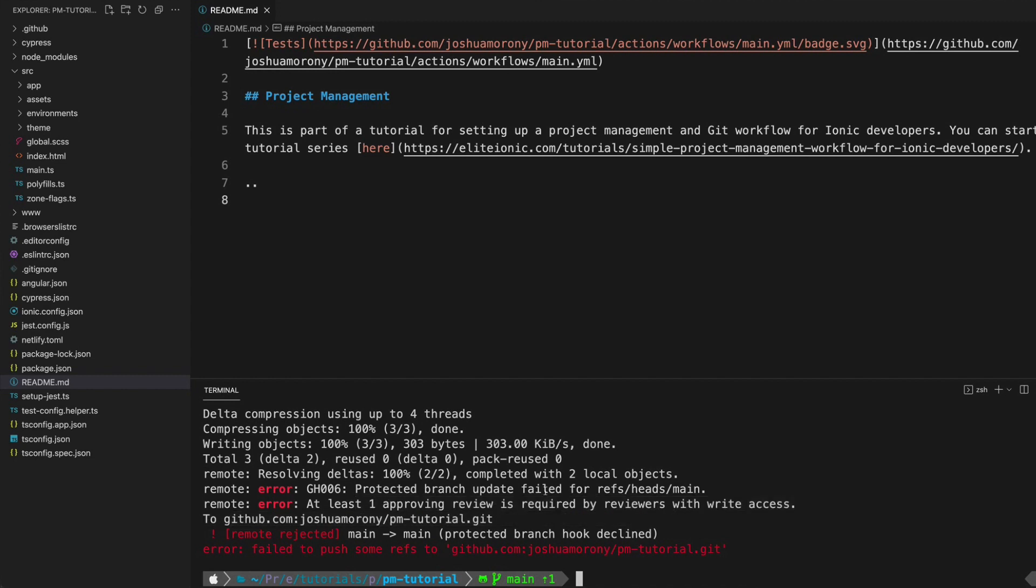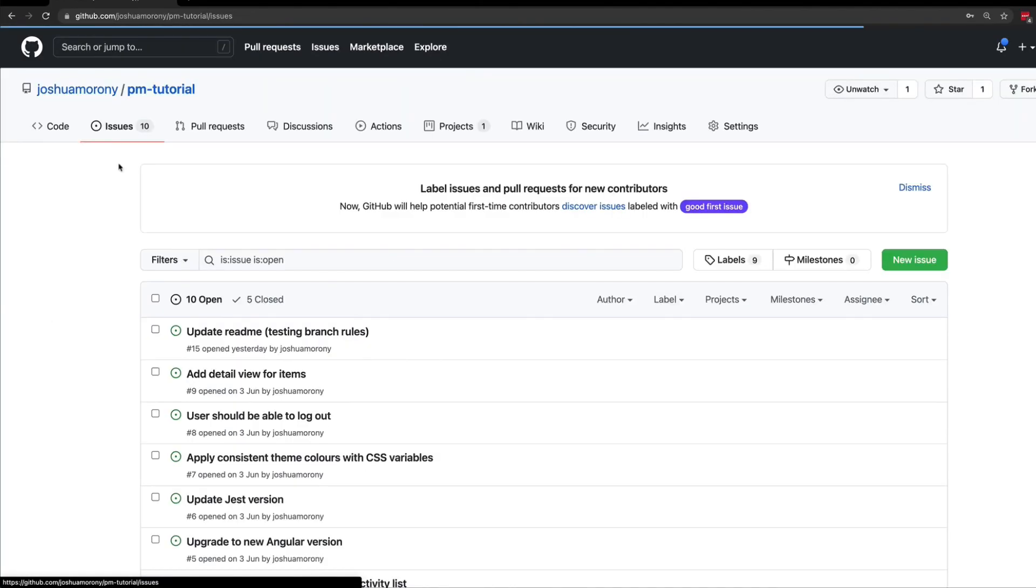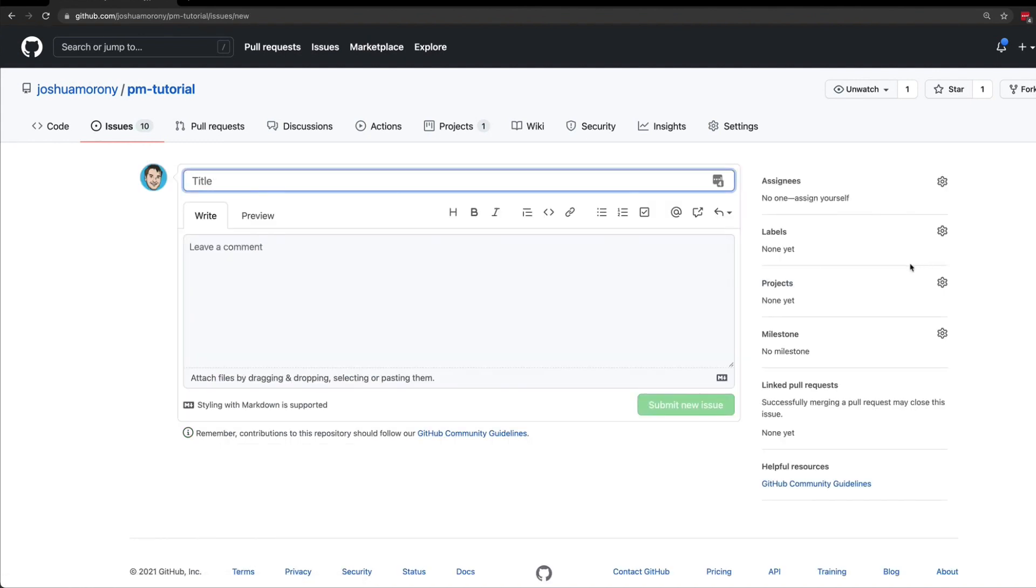At this point I might realize my mistake and realize I'm not supposed to be pushing directly to the main branch. Instead I'm going to follow our normal project management process. You don't have to do this, but what we have been doing so far throughout this project management series is creating issues for every task that we are working on. An issue is created, then a branch is created for that issue, and then the work is completed and merged back into the main branch.